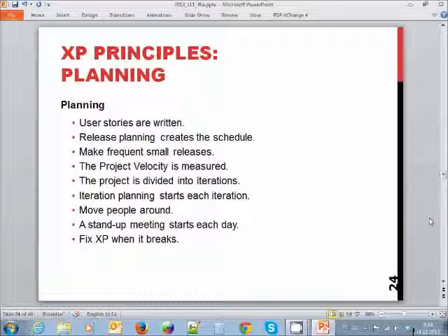The release planning, meaning that the small iterations, what features we are going to do at what iteration. First week we create movement. Second week we create the attack animations. Next week we will do the climbing animations. Then we will add the enemies and these sort of things. Our basis for the schedule. So we know that by the end of the week 4, we should have a character that can move, that can use their sword, can climb up ladders, and we have enemies which just walk around at the game. But that's our schedule there.